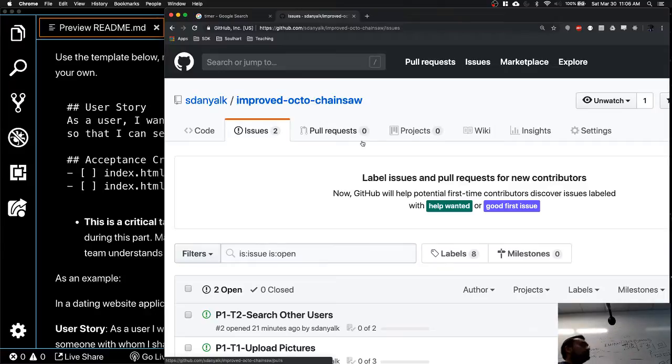Okay, so starting fresh, I would suggest do like 2 days and have a realistic goal in mind. Not, I'm going to research, I'm going to write, I'm going to complete the whole Spotify thing in 2 days. Still unrealistic. More realistic is, I research, I have good knowledge, I am the SME. SME means subject matter expert. I am the SME in the team that knows how to use Spotify by the end of 2 days, right? If the team has any question, they're going to ask me and I should be able to answer, right?